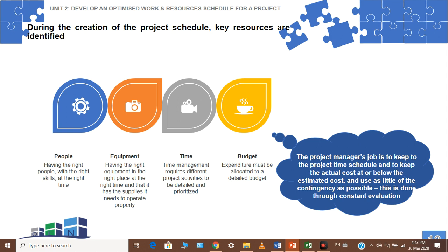In the alternative, where they can only give a quarter dedication to the actual process itself, it still will remain at 10 days, because those four people are working at one quarter into that 10-day process slash task. So we do look at all these and look at how they interrelate and affect one another.